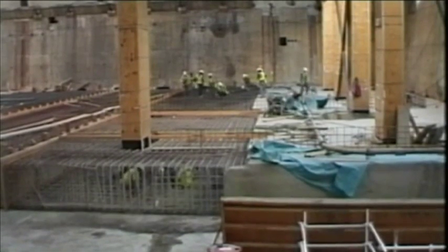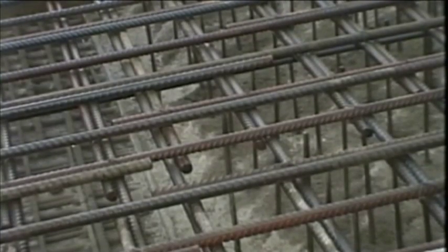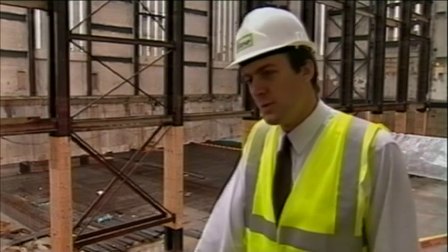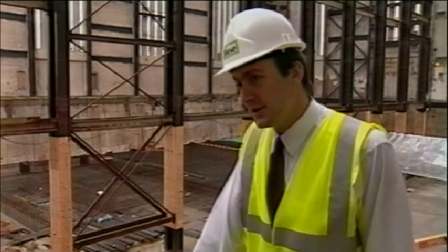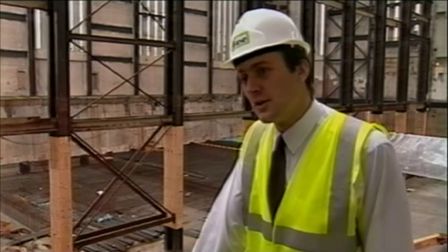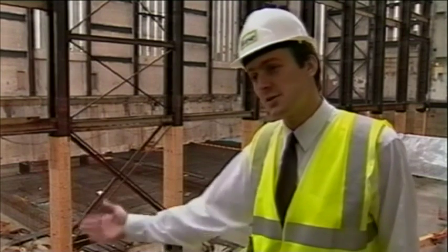As the previous load of concrete slowly hardens over several hours, Burs and Schall look on with horror. Unfortunately, we were let down by our suppliers. It's a hard lesson to learn in that we were bit very hard. It's cost us a lot of money. What lesson can you learn? If we have 2 pumps and the 2 break down, if you have 3 pumps and 3 break down, I mean, in the eyes of the client, that was a bad slip.